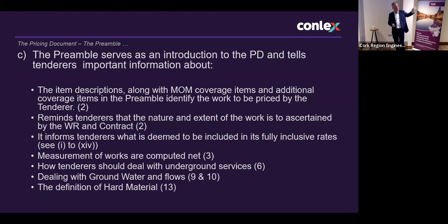Why is the preamble so important? It effectively serves as an introduction for tenderers to the makeup of the pricing document, an explanation of the pricing document in relation to descriptions, item coverages, etc. It alerts them to additional coverage items that are put into the contract, which have to be stated clearly in the preamble.